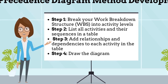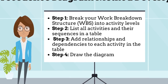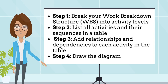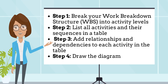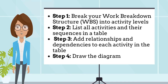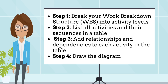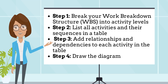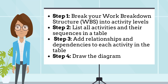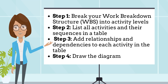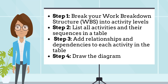There are four steps associated with developing a precedence diagram method. Step 1: break your work breakdown structure, WBS, into activity levels. Step 2: list all activities and their sequences in a table. Step 3: add relationships and dependencies to each activity in the table. And finally, step 4: draw the diagram.